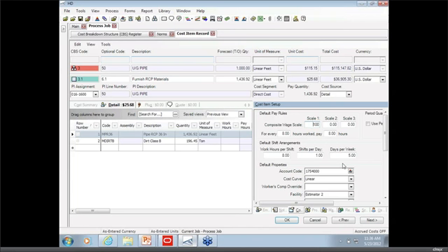For this activity, we could change it and say we're working 10 hours a day, 6 days a week, and we're going to do an 80-20 split. 80% of the time we're paying standard, and 20% of the time we're paying time and a half. Awesome. Okay.